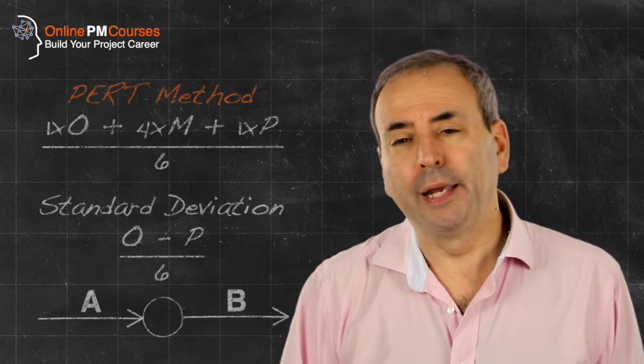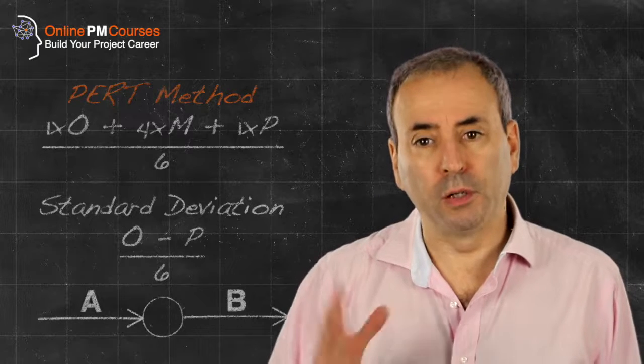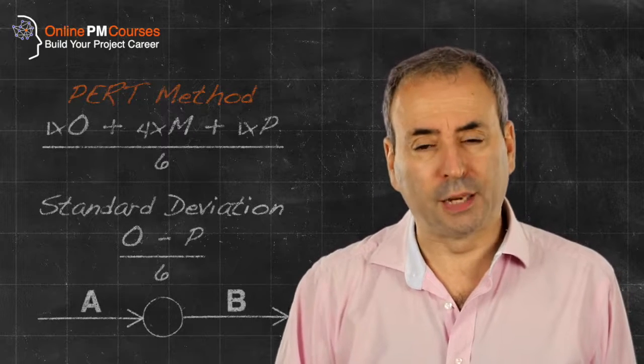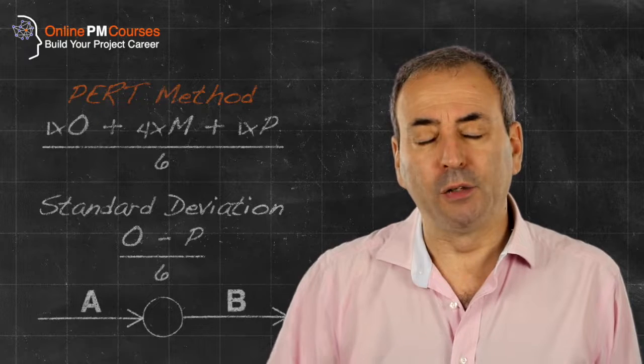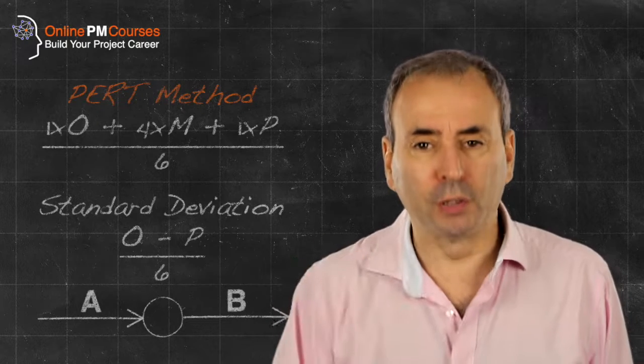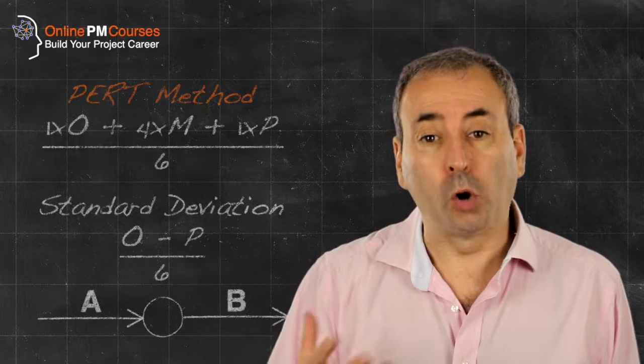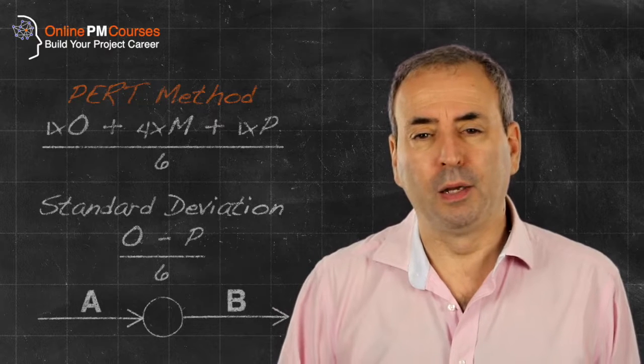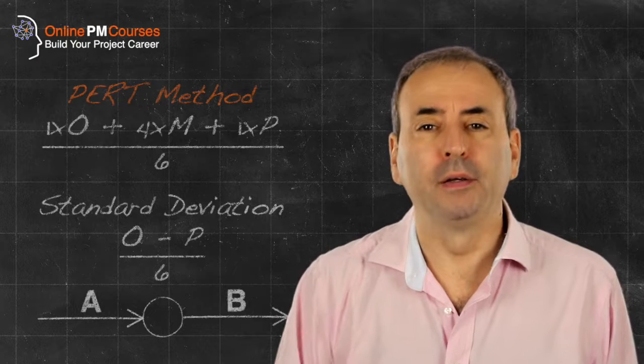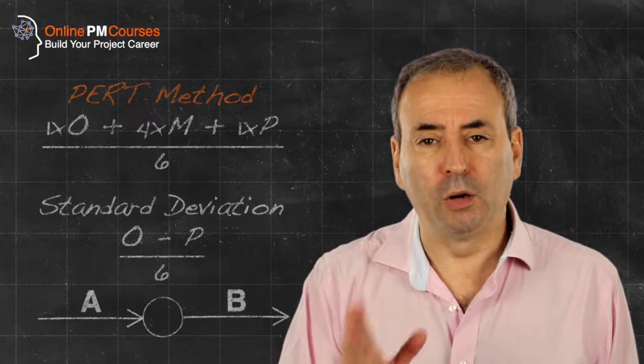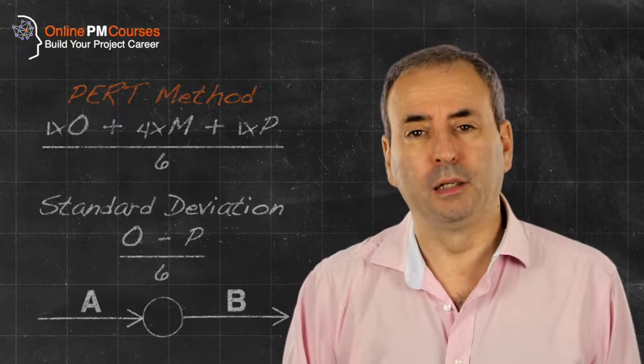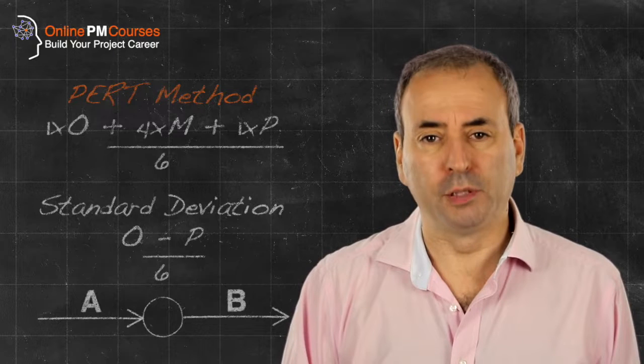And of course, with today's modern software, it's very straightforward to put in all of your estimates for all the tasks and for the software to calculate not only an average duration for the whole project, but to composite all of the standard deviations up and figure out the likely spread from the most optimistic to the most pessimistic estimate for the whole project.